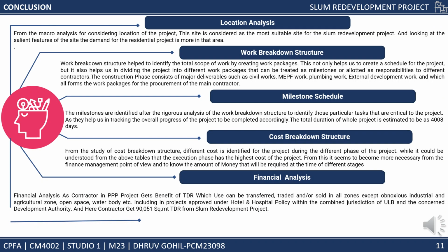In the end, we conclude in the location analysis that this site is considered the most suitable site for the slum redevelopment project. Looking at the salient features of the site, demand for a residential project is higher in that area. In the work breakdown structure, we conclude that it helps to identify the total scope of work by creating work packages. This not only helps us create a schedule for the project, but also helps in dividing the project into different packages that can be treated as milestones or allotted as the responsibility of different contractors. In the milestone schedule, we conclude that the total duration of the whole project is estimated to be 4008 days.